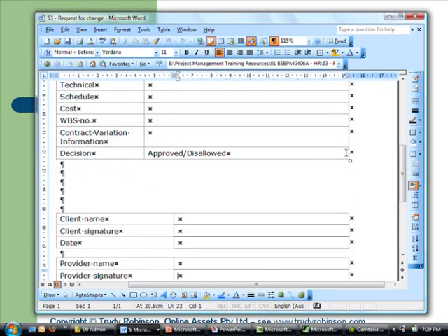Now, one of the things you'll get is lots of folders, and you'll have a register of requests for change. So you might end up with lots of individual sheets of paper that have been signed off, and then you may have a summary at the front which says these are the requests for change, the number, what the topic was, whether it's been approved or declined. So this again is just another document that you may choose to use as a tool. It's part of the communication back to the team or back to the rest of the stakeholders in the project.